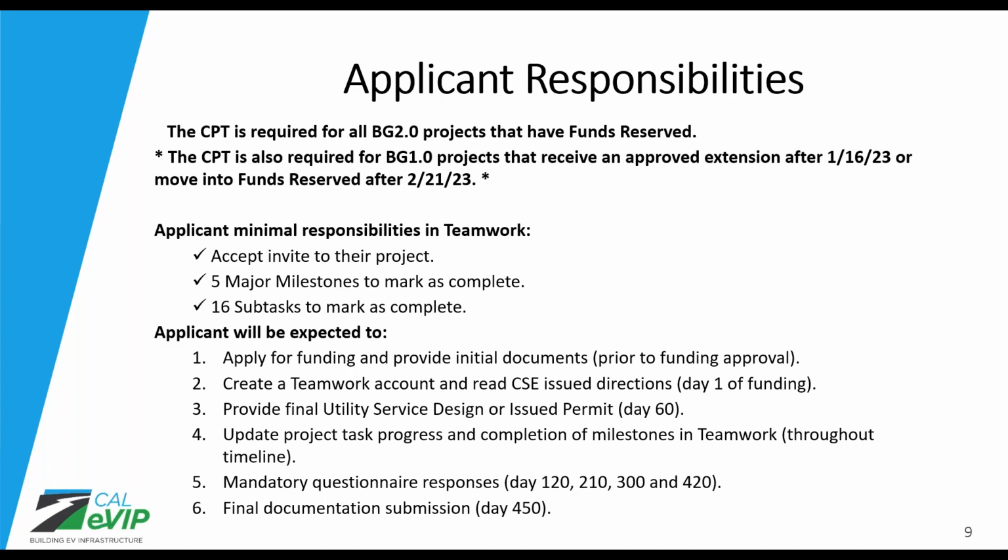The absolute minimal responsibilities for the applicant, for yourself within Teamwork, is first of all, and very importantly, to accept that initial invite to Teamwork, to create your profile in Teamwork. There are 5 major milestones within each project to mark as complete during the life of the project, and there are 16 tasks to complete along the way.